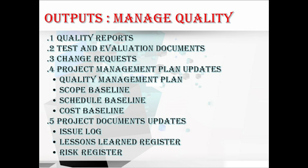For project document updates, we have the issue log, lessons learned register, and risk register. New issues raised as a result of this process are recorded in the issue log. The lessons learned register is updated with information on challenges encountered and how they could have been avoided, as well as approaches that worked well for managing quality. New risks identified during this process are recorded in the risk register and managed using the risk management process.